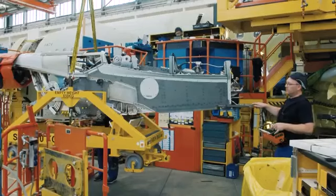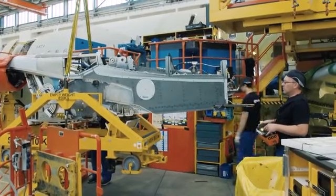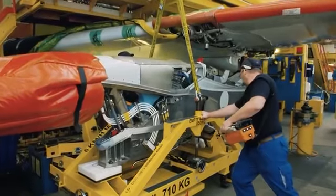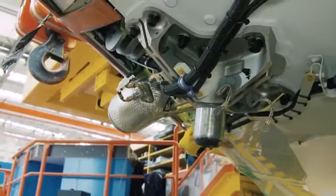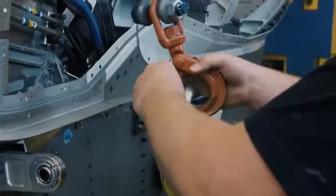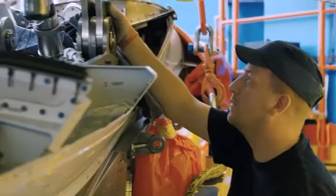If one gets damaged, it's unlikely, but should it get damaged and we can't install it onto the aircraft, this can have for sure an impact in our complete flow line. We can for sure take a different pylon which was destined for another aircraft and install it onto this aircraft to recover the situation, in which case we do have then some paperwork to complete.